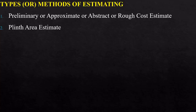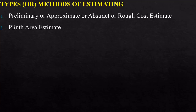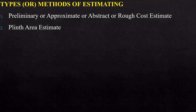The second type of cost estimate is the plinth area estimate. Here the estimate is prepared on the basis of the plinth area of the building. The rate for such an estimate is deduced from the cost of similar buildings having similar specifications, heights, and construction in that particular locality. The plinth area estimate is calculated by multiplying the plinth area of the building by the plinth area rate.